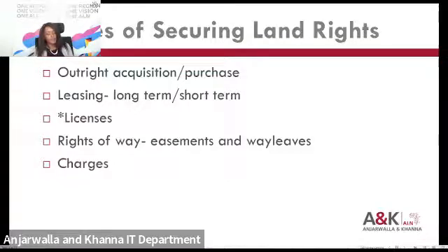The other method of securing land rights is through leasing arrangements. So this will vary depending on the nature of the project. Is it a short-term project? Is it a project for life? So for instance, if you're undertaking a road project, it's more likely that there should be an outright acquisition because this is a permanent structure. If the land required is for a temporary period, then a leasing arrangement might be more suitable.